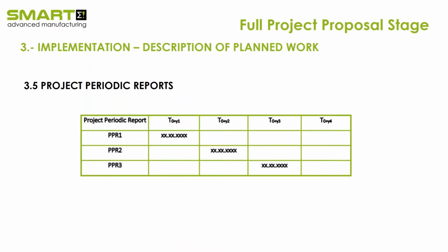And next come the project periodic reports. Like in any other project, you will have a project duration. The project lasts 2-3 years, and you identify the periodic reports, for example the first 12 months and then the next 18 months in 2 reporting periods for a 3-year project. This is up to you, but of course, make it in a logical way.